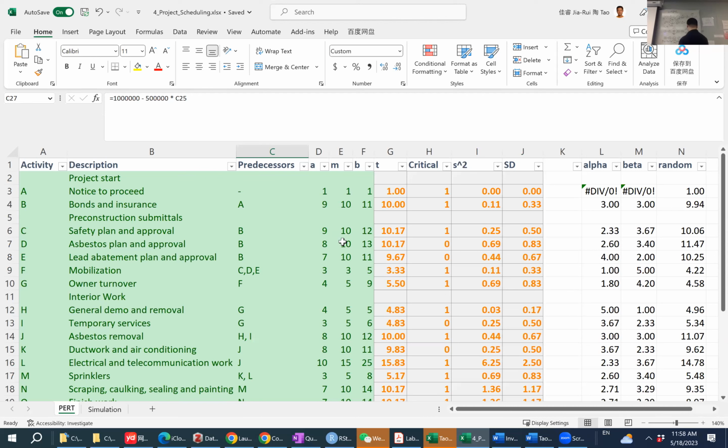And we do that for J, but here in this branching structure, we notice that L takes a longer duration than K. So when calculating total duration, we only include activity L, not K. And we do the rest. So we have N, O, and P included. Here, my choice is that I included C and H.